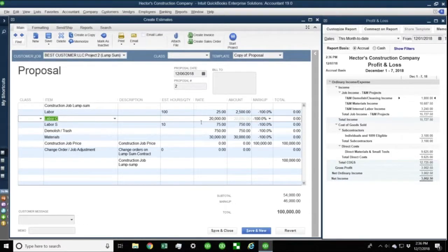Let's say we're going to bring in now a major subcontractor to do part of this work. One of the things I like to do, once you enable purchase orders, and we're going to cover that on part 2, is create the purchase orders straight from the estimate. That way we can have a link between all the purchase orders that we're sending to our contractors or subcontractors, or even for material purchasing. This time I'm just creating them from scratch, but on part 2 we'll cover that because that's more pertinent to QuickBooks Premier, because QuickBooks Pro cannot do that.